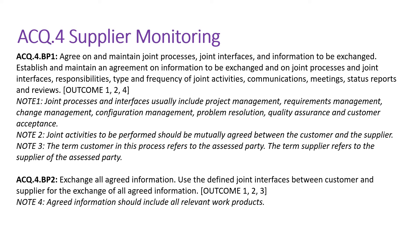BP2 or Base Practice 2 talks about exchanging all agreed information. Use the defined joint interfaces between customer and supplier for the exchange of all agreed information. How you are going to exchange information — what is the configuration management tool, whether you have a joint access system — all to be defined and agreed. Your contract will have details of your problem resolution management, requirement management, change management, configuration management, and what tools you will use. Quality assurance, project management, and customer acceptance — all these things will be discussed as part of your contract document.